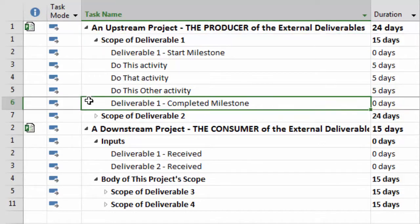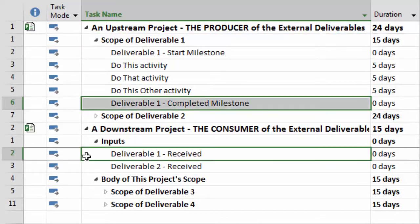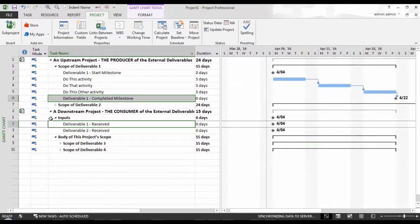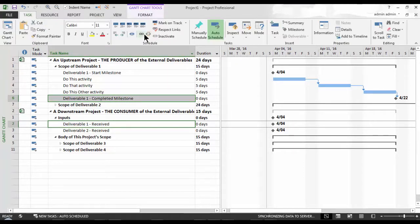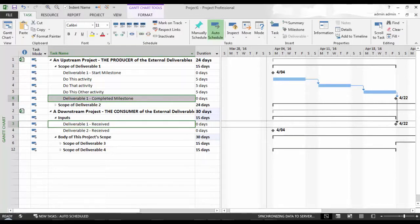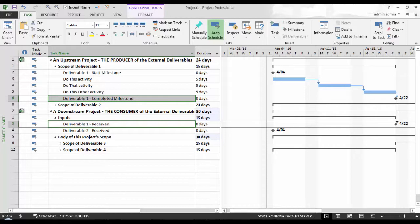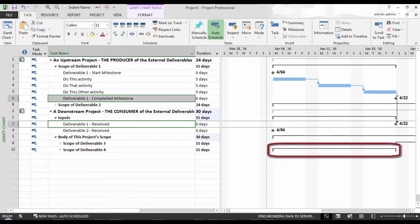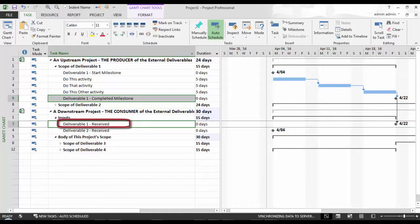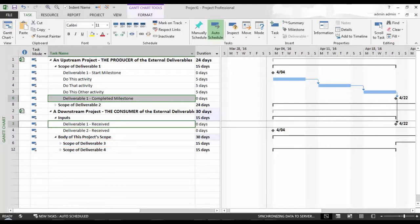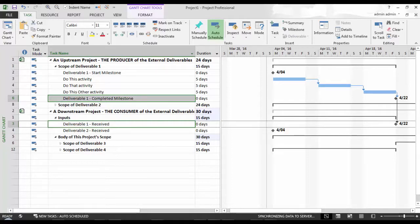I'm expanding Scope of Deliverable 1 in the upstream project because I've created a milestone to mark the completion of the Scope of Deliverable 1, which I will select to drive the Deliverable 1 received in the downstream project. With both these tasks selected, I will go ahead and link them like I would any task. Control F2 is the shortcut for creating the default finish to start dependency. Once I do this, the Deliverable 1 received will have moved 15 working days into the future away from April 4th. And so will the Scope of Deliverable 4 be shown to start the same 15 working days. This is because Deliverable 1 received was already set up with an internal dependency that's driving the Scope of Deliverable 3's start.